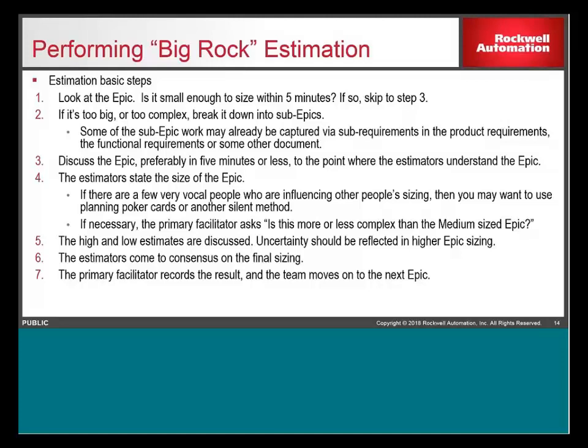In cases where you have people estimating high and estimating low, just like in Scrum sizing, have the team talk about how big it is, why are you estimating higher, why are you estimating lower. Someone may understand the complexity, or maybe there are some additional things that aren't captured in the scope that may have an impact. So maybe you're going to be changing from a particular unit test tool to a different unit test tool that wasn't captured as part of the scope. Well, that means you may have some risk with adopting the new tool that needs to be taken into consideration.